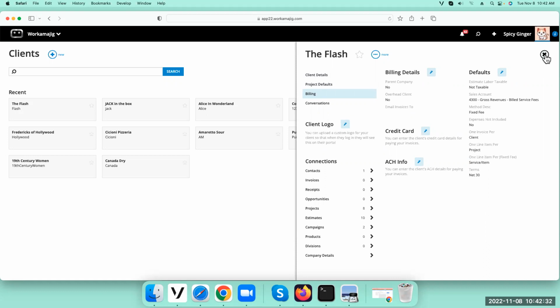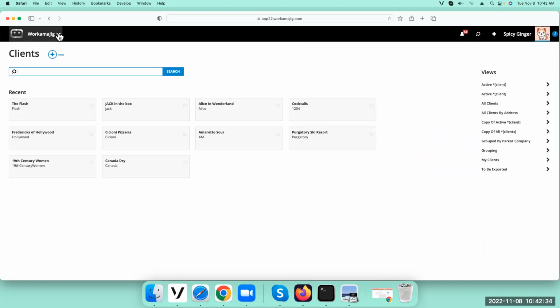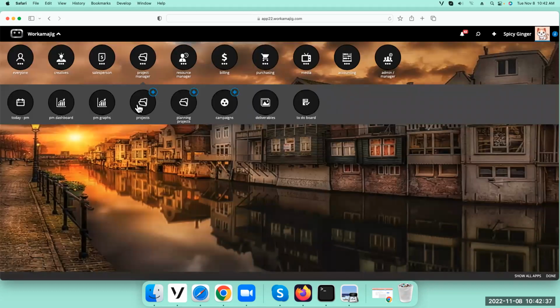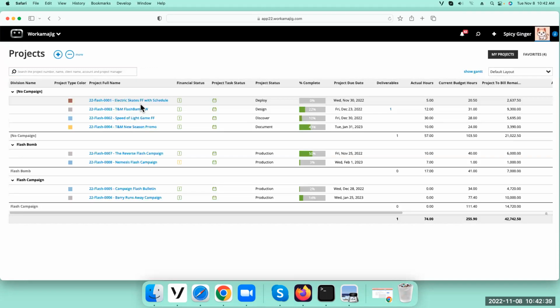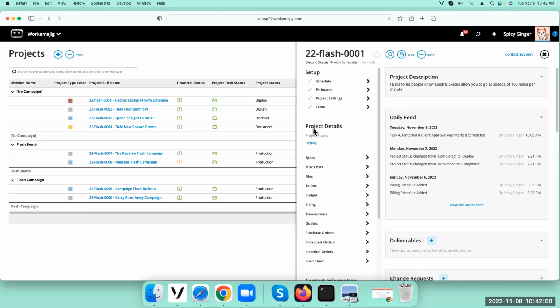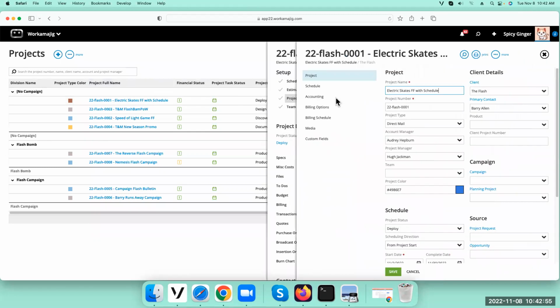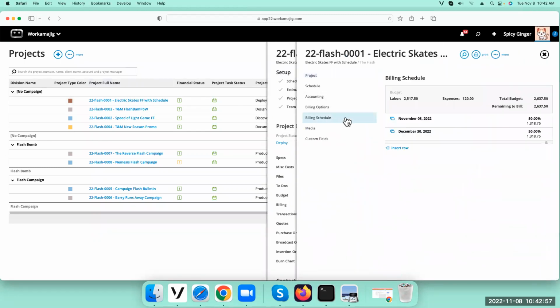All right, so what you should note before, also, when we talk about the projects and what's going to generate, what you can see, I do want to mention one thing. If you have a billing schedule, billing worksheets adhere to that schedule. So this is a fixed fee with a schedule. If you're using billing schedules to determine when you want that to generate for the amounts, this 1318 is half of this, and it's going to generate today.